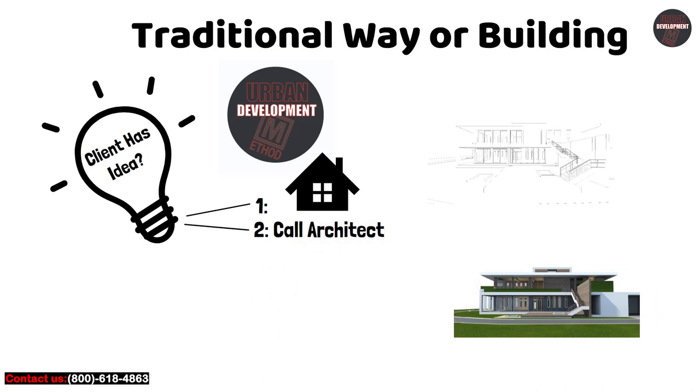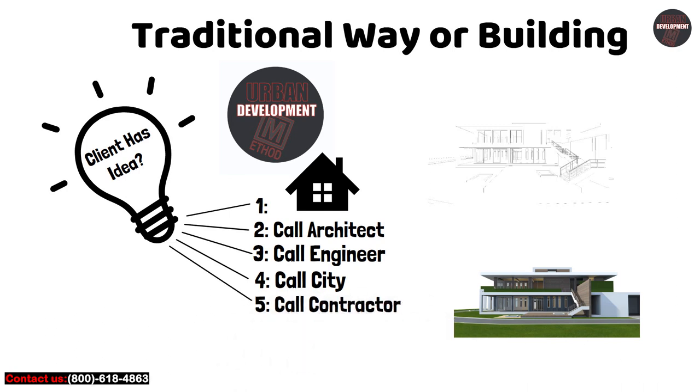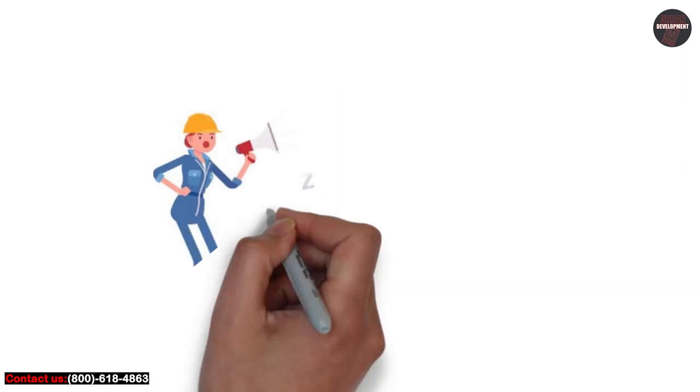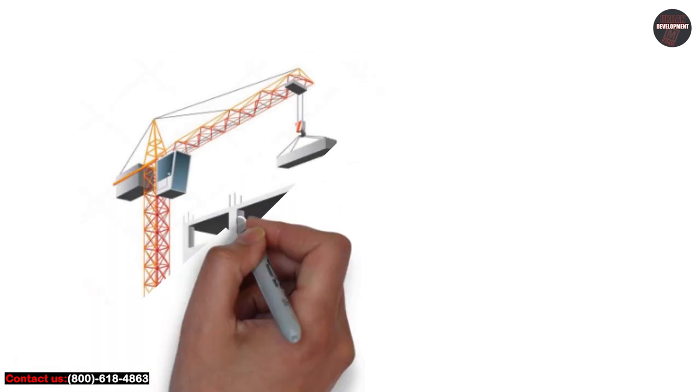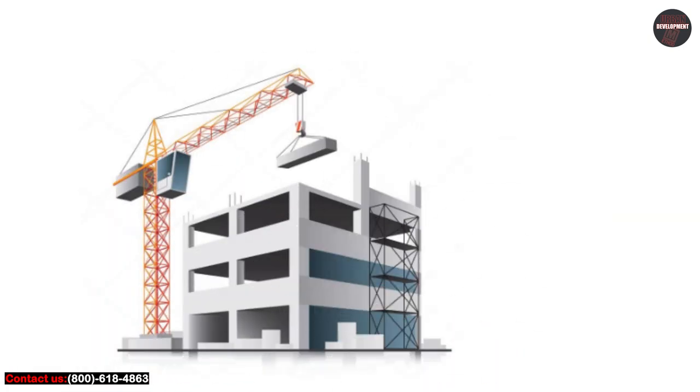As a result, there's a lack of specialized construction expertise on the design team, leading to incomplete, unclear, or impractical design specifications. These design challenges inherently cause expensive, time-consuming changes late in the project, conflicts between architect and contractor and, ultimately, increased owner risk.